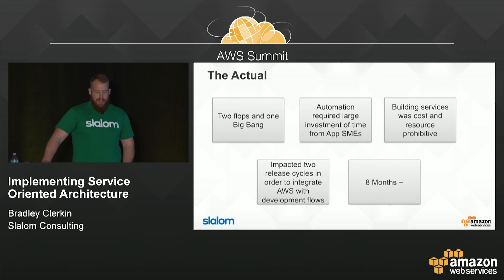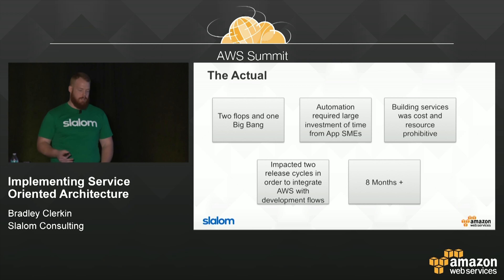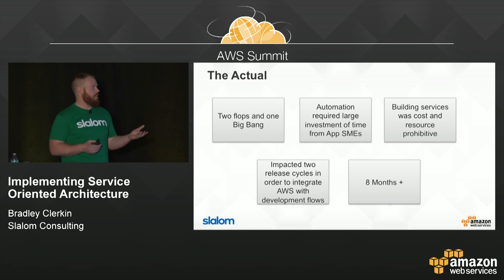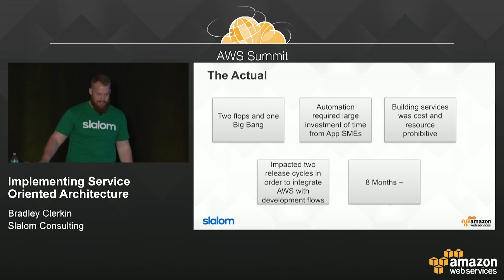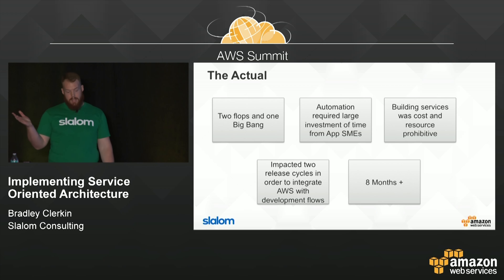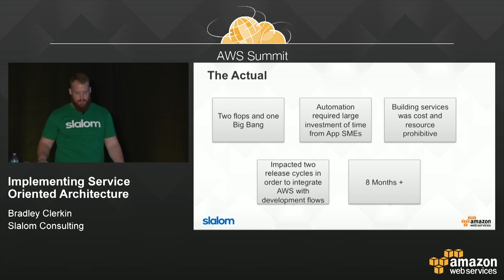What actually happened: we had two flops and one big bang. We failed at the last hour of migration twice because CRC checks on the databases wouldn't pass. For a financial services firm, when auditors come in, the first thing they ask is how you confirmed your moved data was an exact copy with no lost transactional data. We learned our lessons and finally had one successful big bang. Once they were there, it worked — they got calls saying the interface was working great, performing great.